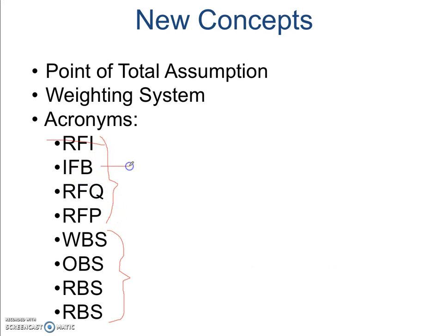And the invitation for a bid is really used a lot in the construction industry. It's when you have a design already implemented, a blueprint, and you're just trying to get the cheapest or more cost-efficient price that you can get based on the vendors. What's the cheapest price for the design you already have? It can be a really straightforward sort of contract.